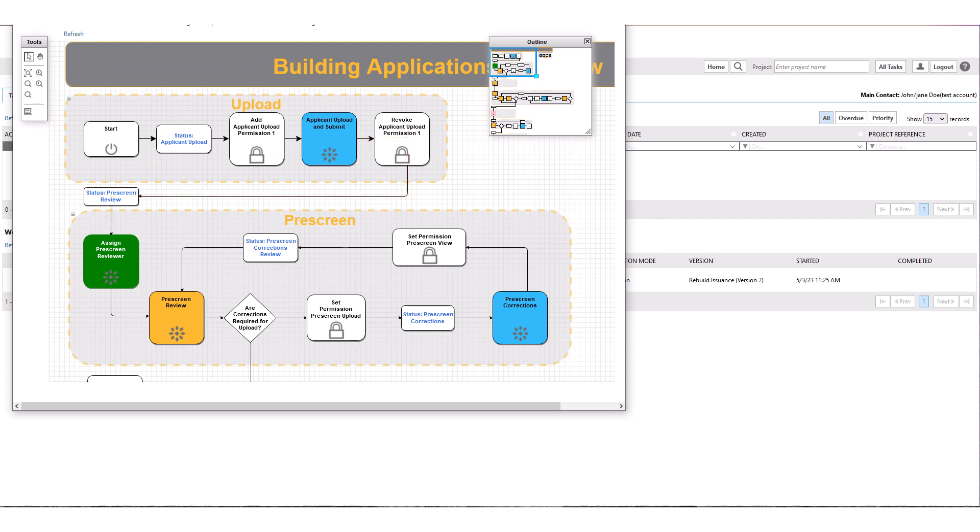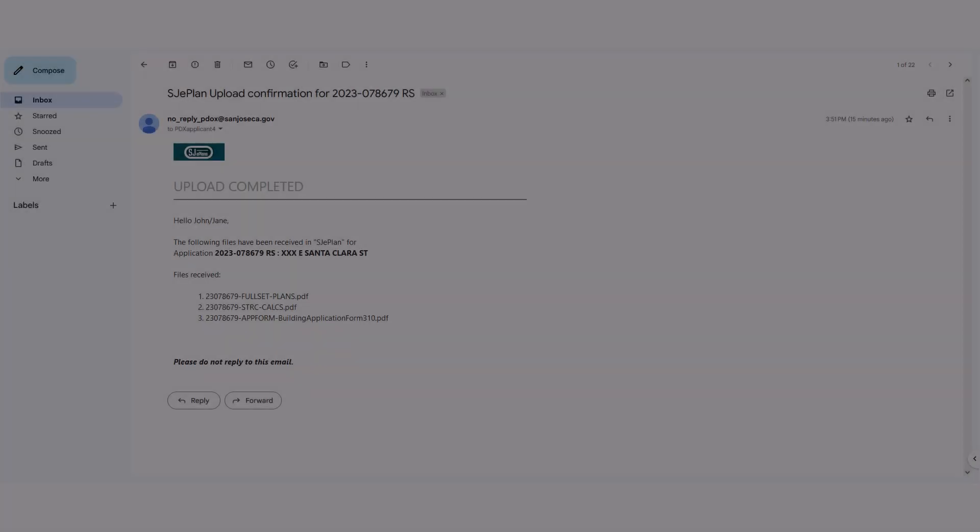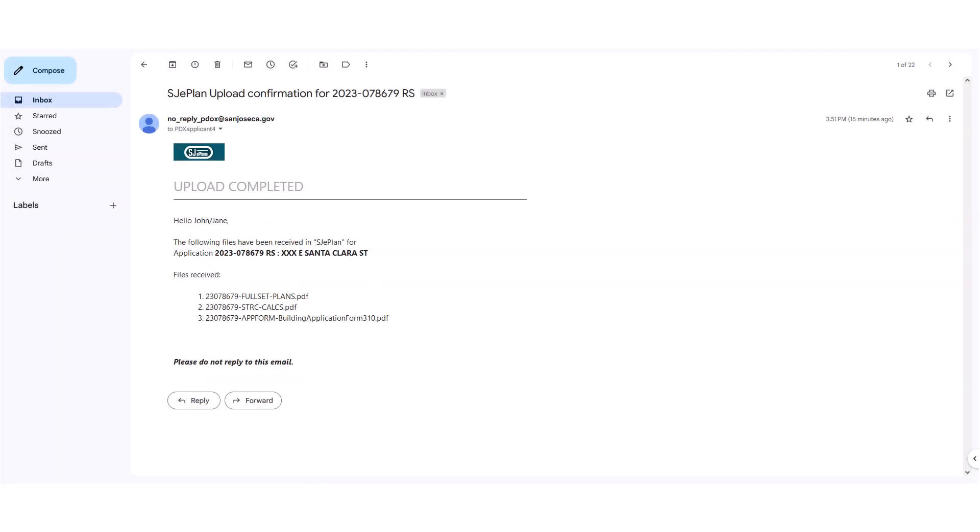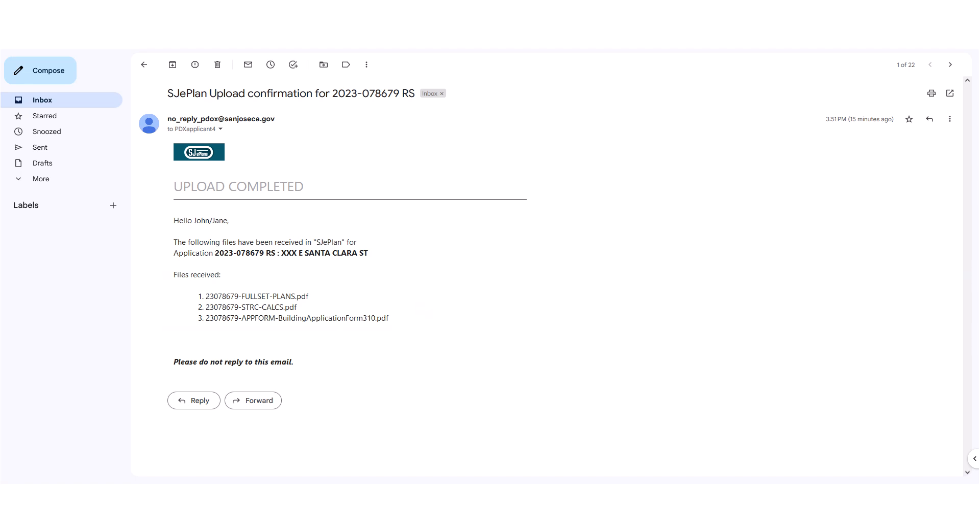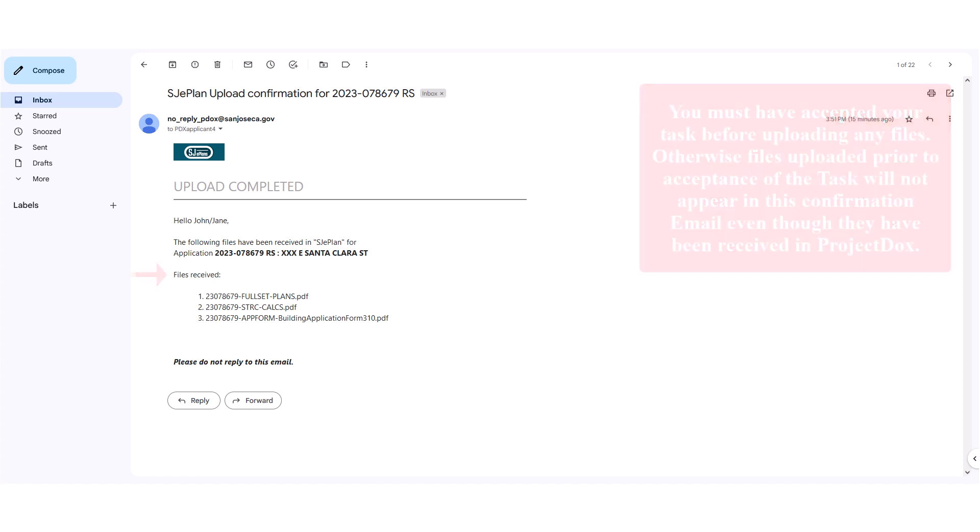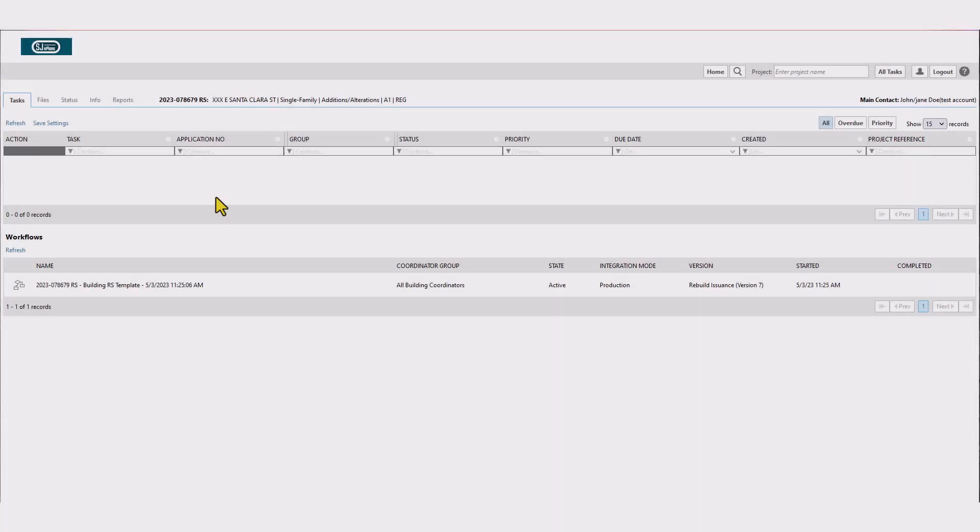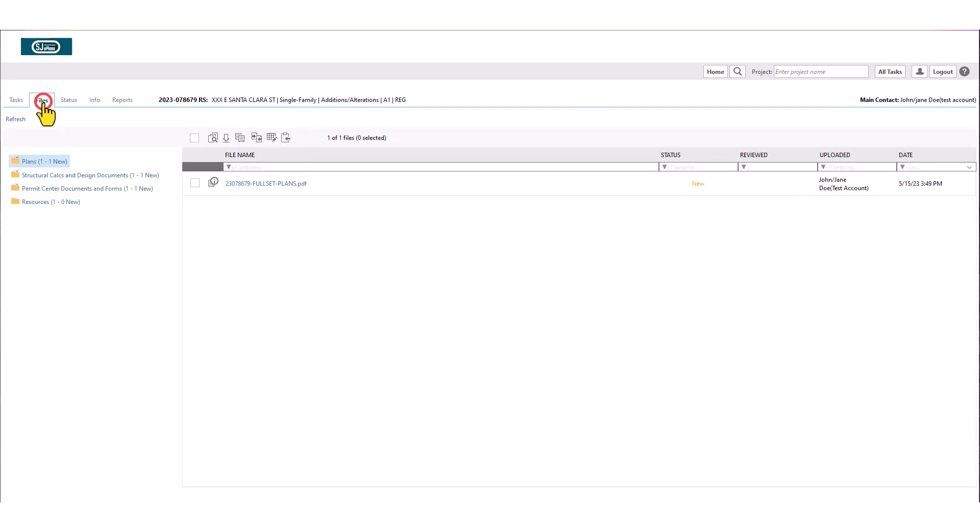Following completion of your task, you will receive a notification email similar to what is shown here, containing list of all files received by project docs. Please note, you must have accepted your task before uploading any files, otherwise files uploaded prior to acceptance of the task will not appear in this confirmation email even though they have been received in project docs. You can always verify all the files saved in project docs by going back to the project page and checking the content of each folder.